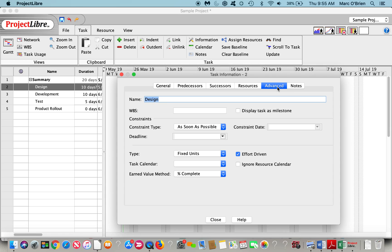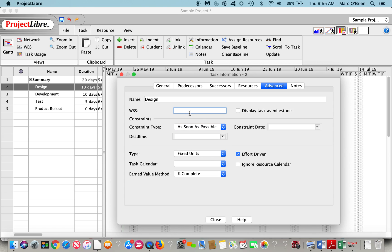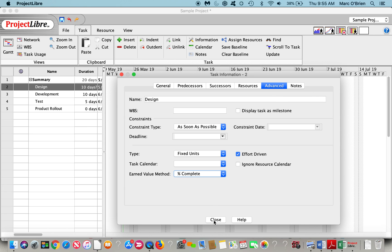On an advanced standpoint, you can do constraints. The default is to start as soon as possible. However, for costing purposes, particularly on non-critical tasks, you may want it to start as late as possible, or finish no earlier than, finish no later than. It could be an effort driven task or a time driven task. And we also do earn value costing, which we won't go over today. It's more advanced features.